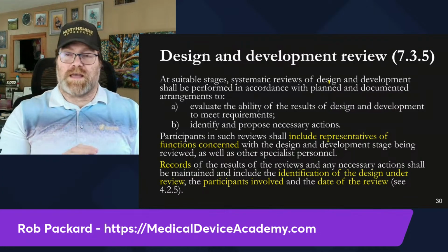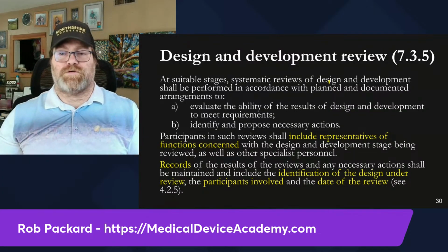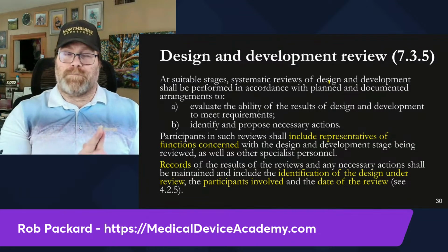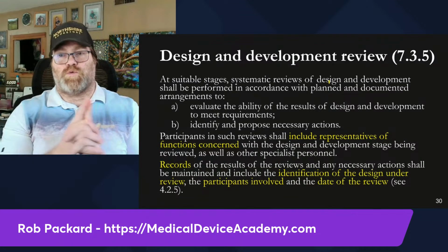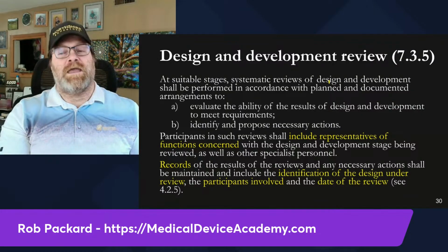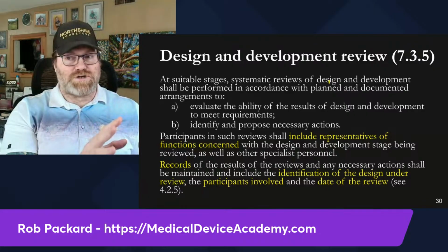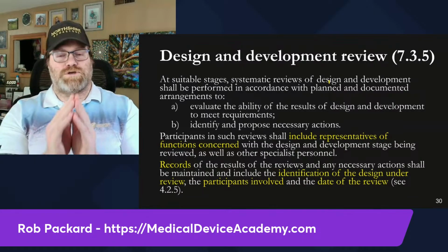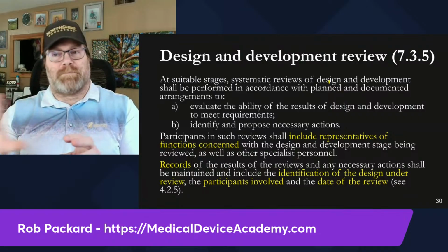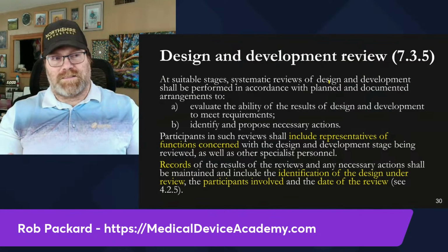So you decide for your project how many reviews you want and why. If I were going to do more than one, I would probably do one at the design freeze and do one at final release, because I'd be using a hybrid process. And after I'm done all my iterations, that's when I would do the design freeze review. And that's when the big money starts getting spent, not the little money.